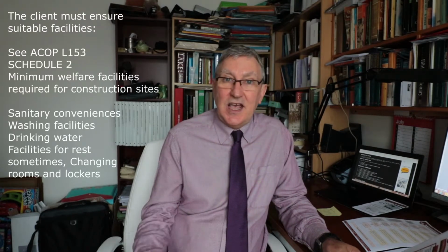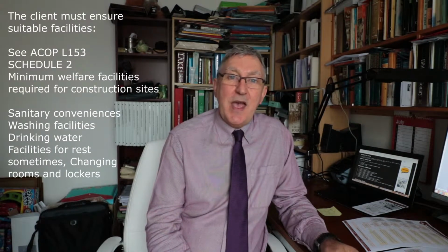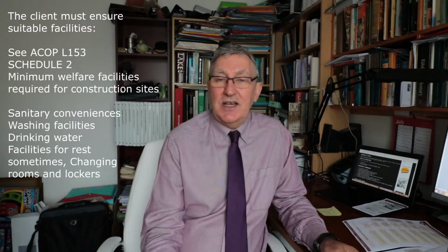The client must ensure provision of suitable facilities for the works, and there's a schedule in there which lists out those facilities. For simple repair works, it might be just easily explained to the contractor when they arrive on site the emergency procedures for that site, where the toilets are, where the wash basins are, where the emergency exits are, simple things like that that the contractor might need to know on his arrival.